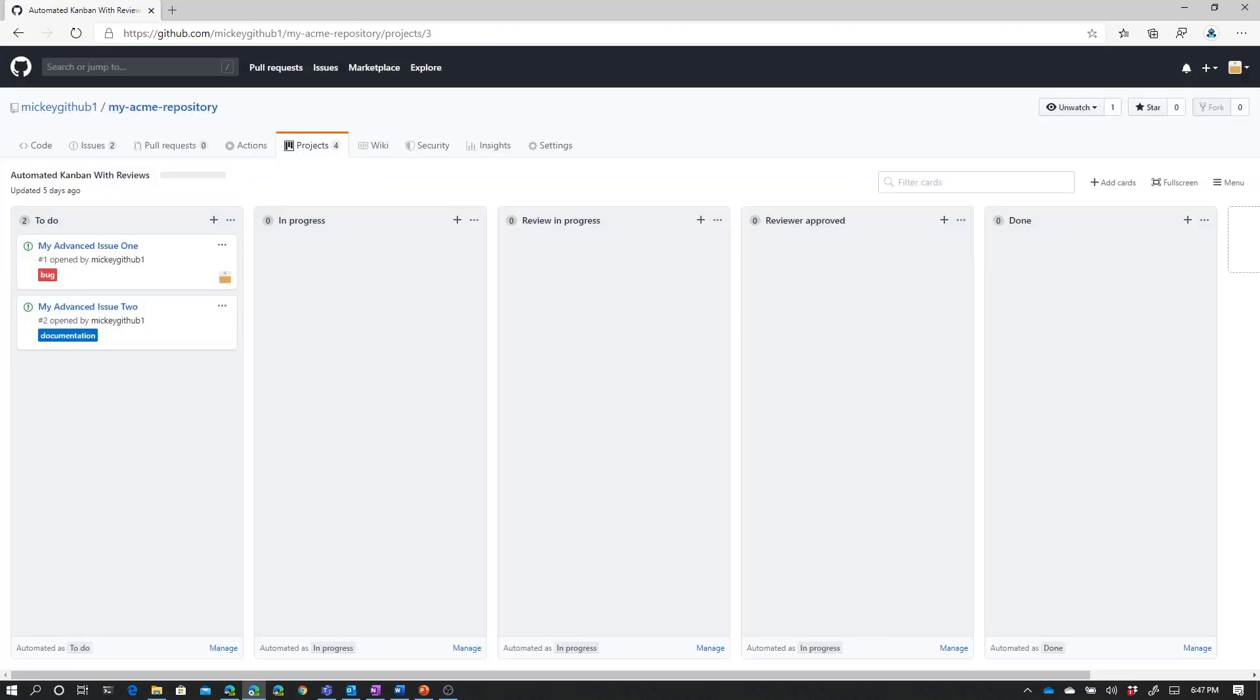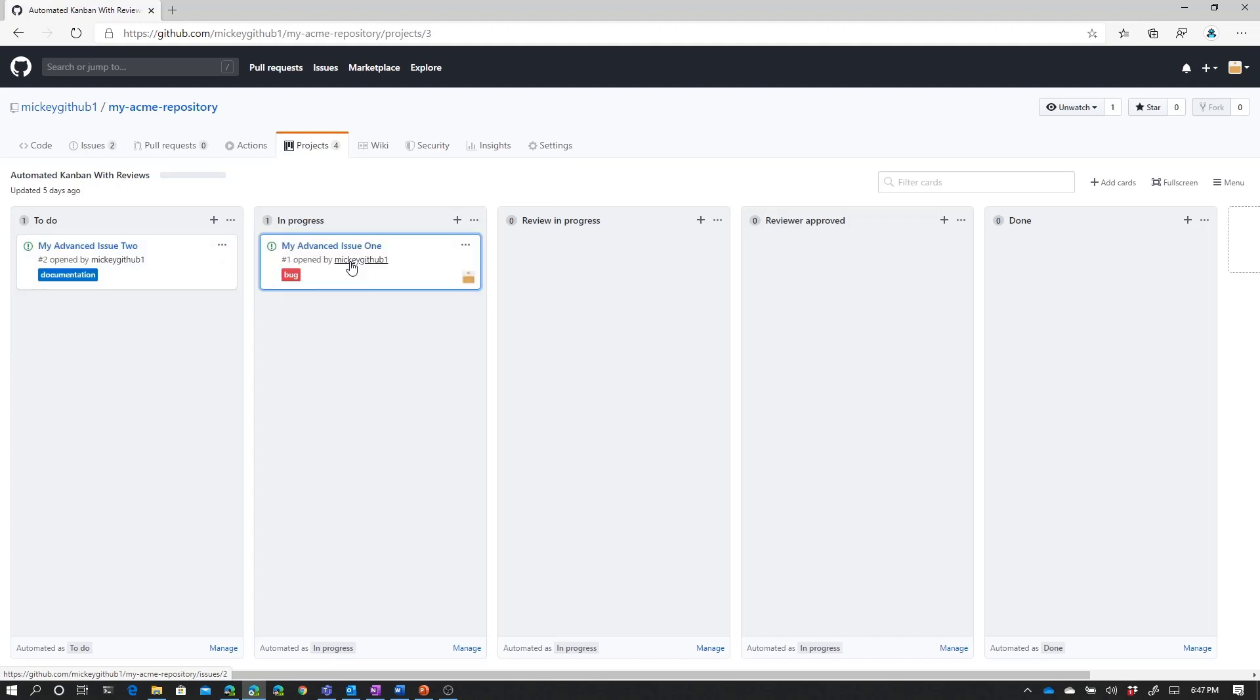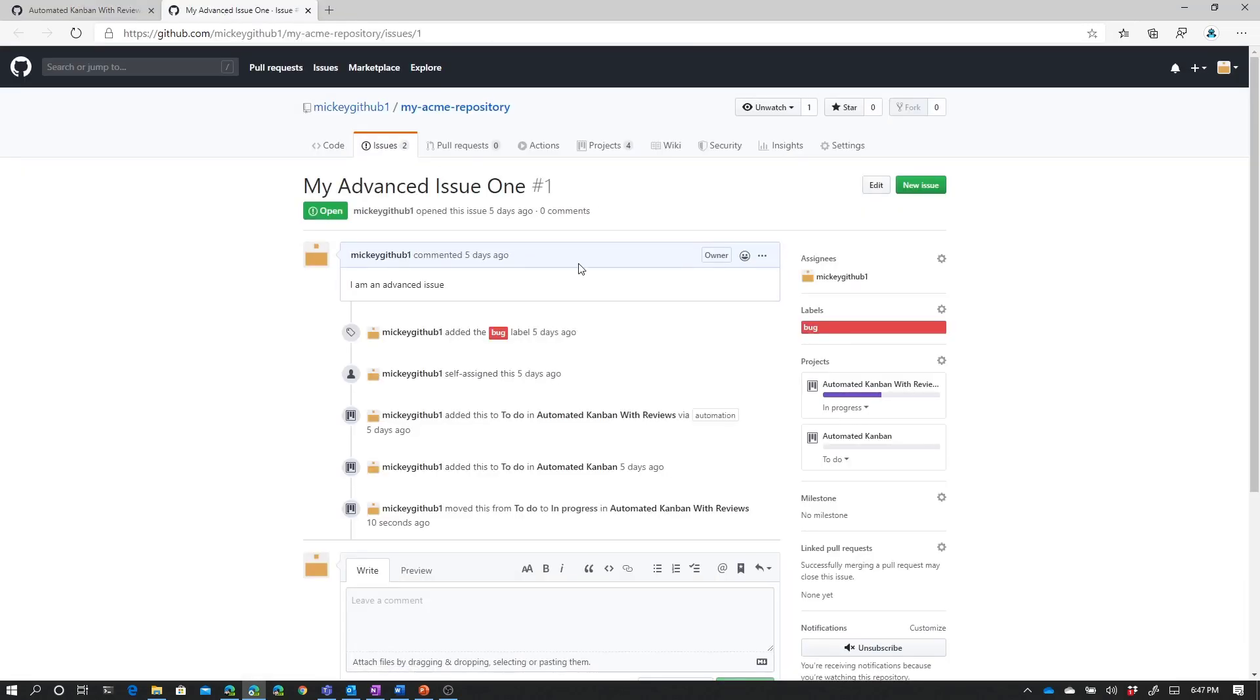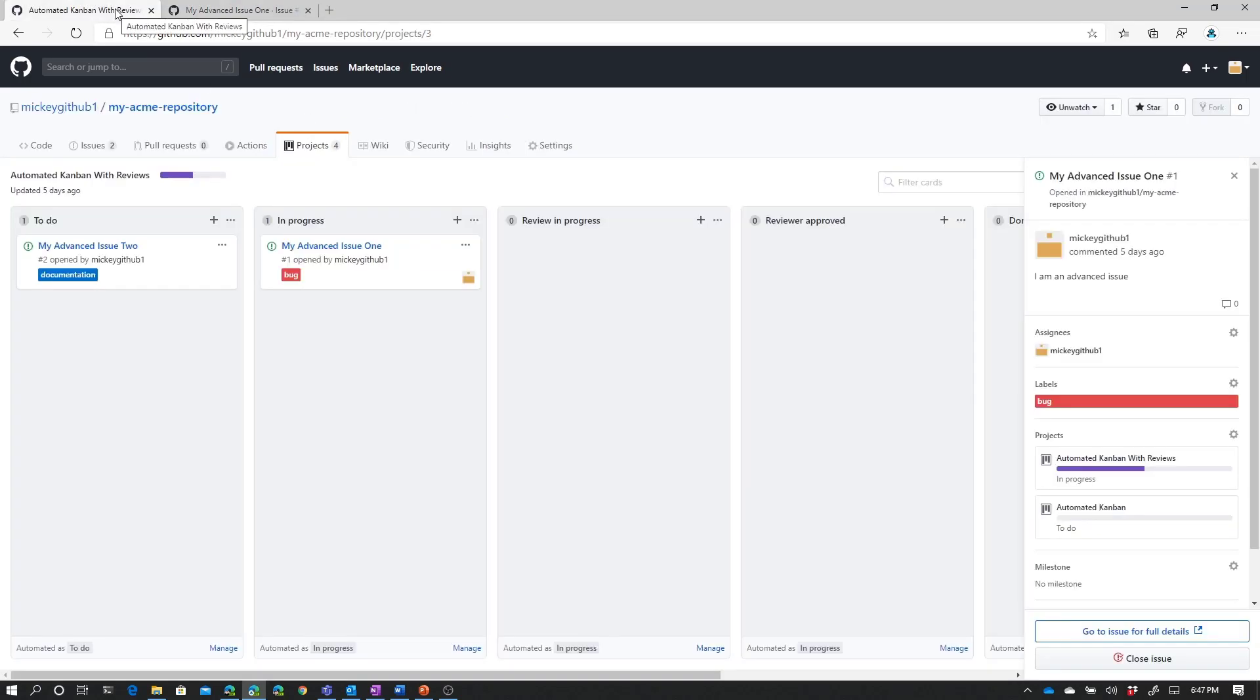So, some general workflow that we might follow is we add a new issue to the board and it automatically gets put in the to-do column. While that issue is being worked, it's manually moved to the in-progress column. Now, I'm not going to see anything on the issue itself that necessarily says this was moved to the in-progress column. But you can see that the status of the board updated to show that we've got one to-do and one in-progress.